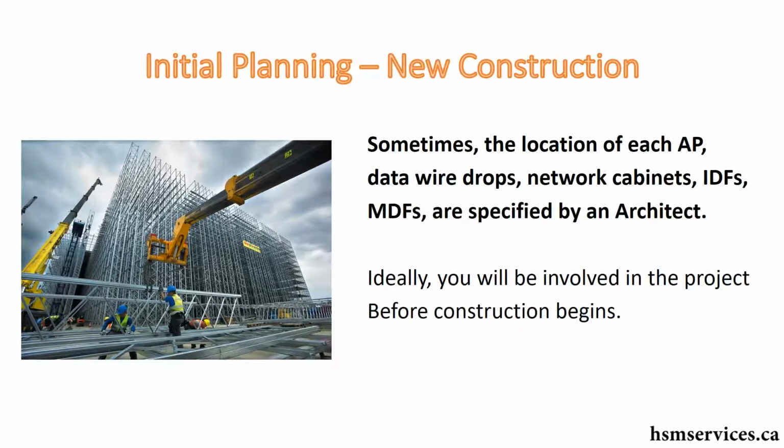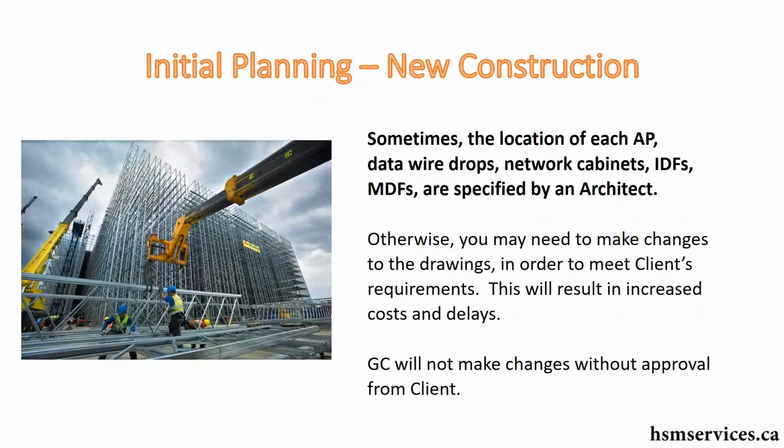So ideally, you'll be involved in the project before construction even starts. But maybe not. Otherwise, you're going to have to make some changes, and making changes is not always easy, because if you're not pulling the wires, or you're not installing the conduit, then the GC has to get his electrician to do that for you, and if it's too late and they already put up drywall and whatever, that's going to cost more money, and the GC is not going to do something that costs him money unless the client is going to pay him the money.